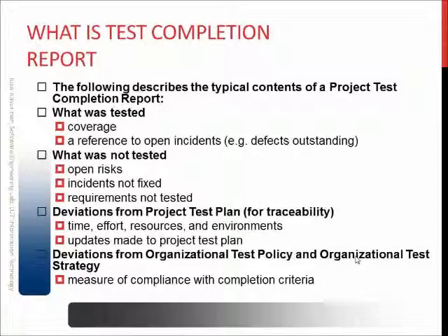Okay, so that's what the test reports and especially the test completion report are. The test completion report is the fourth main document. It's more or less a report or autopsy of the project. It includes all the things: what was tested, what was not tested, how we deviated from the test specifications, why we did so, and how things worked with these deviations, possibly some recommendations for changes in the future way we do testing.